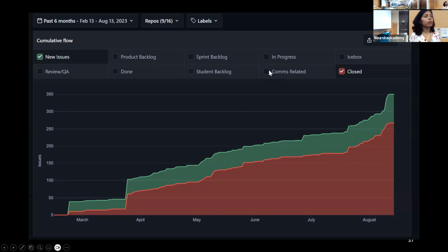Even the tasks that the program manager who recently joined our team has to do to update our website, we track via GitHub, which is important so that there's good load balancing. You don't want to overload too much on someone. This happens a lot with junior developers, where they will take on more work than they can possibly do. So you have to be careful by asking them for estimates and making sure you're load balancing across the team.